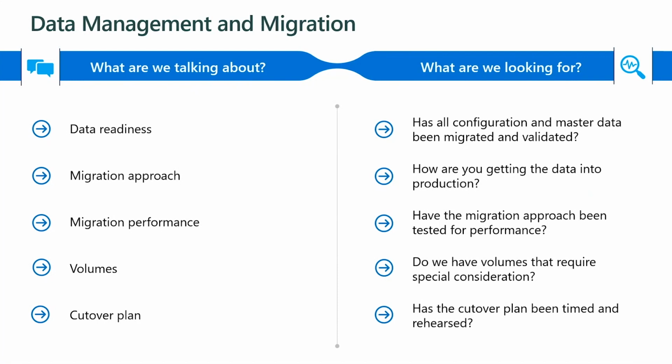The important thing is having all of these validated and tested, so there is an understood, optimized, and rehearsed plan. Knowing how to move data between the environments in a correct and performant way can be key for a successful, efficient, and safe cutover. It should be part of your go live planning to have these steps all documented in terms of order and the expected execution time, or at least approximately.